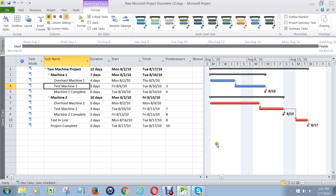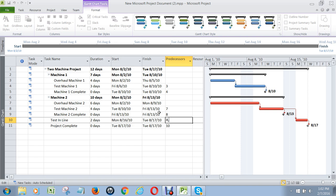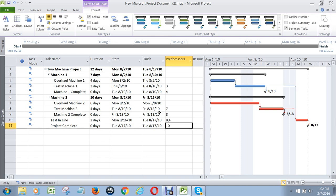The only task that should have no arrow coming out of it would be your last task, and even then that's to a milestone. So look for tasks that don't feed into other tasks. In this case I'm going to put that back again — testing machine 1 is four. See how that now has a line that comes out to a later task? Make sure that you have no dangling nodes.